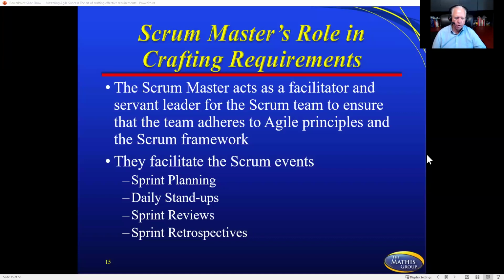Okay, so the Scrum Master is the leader for the Scrum team, and they're trying to adhere to the principles and the Scrum framework. They're trying to make sure that everything's working the way that it needs to work. Now, they facilitate certain things. Now, it doesn't mean that nobody else gives any direction. Of course they do, but that's their role. So they're going to facilitate the sprint planning, daily stand-ups, which are 15 minutes every morning, sprint reviews, sprint demos,